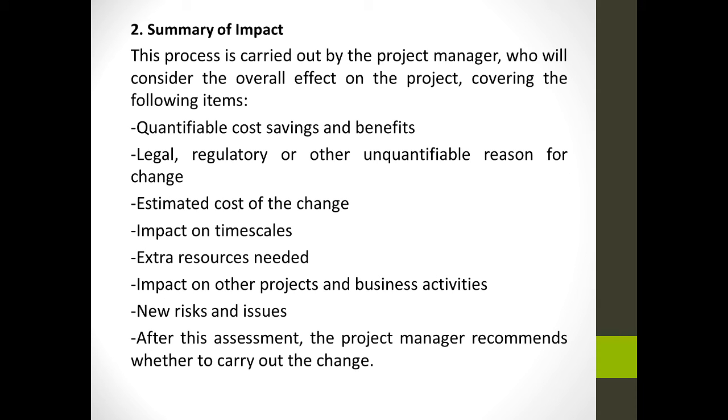Summary of impact. This process is carried out by the project manager who will consider the overall effect on the project, covering the following items: quantifiable cost savings and benefits, legal, regulatory, or other unquantifiable reason for change, estimated cost of the change, impact on timescales, extra resources needed, impact on other projects and business activities, new risks and issues. After this assessment, the project manager recommends whether to carry out the change or not.